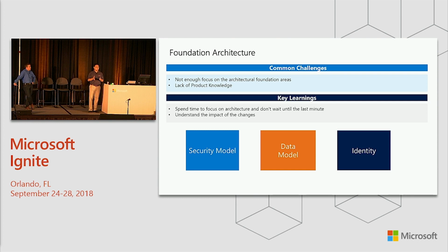Once you've locked it down, put it in change control. The reason is that if you define a security model for the entire solution and then change it later on, it's going to be major surgery. I have seen customers who don't have a security model strategy in place, and at the end of the day they have to redo the implementation, which is really costly for that customer. The second thing is the data model.